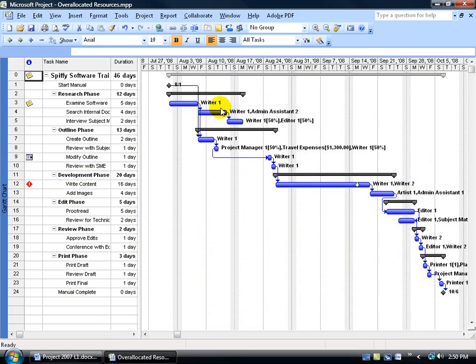An over-allocated resource is a resource that you assign to a task in which that resource is working more than their assigned typical hours. What are the resource's assigned typical hours? When you create your project calendar and tie it to your project, you can define what the typical days are going to be. Mine were 8-hour days, so anytime I assign a task to a resource, by default it assigns them at 100% in units, which is 8 hours.